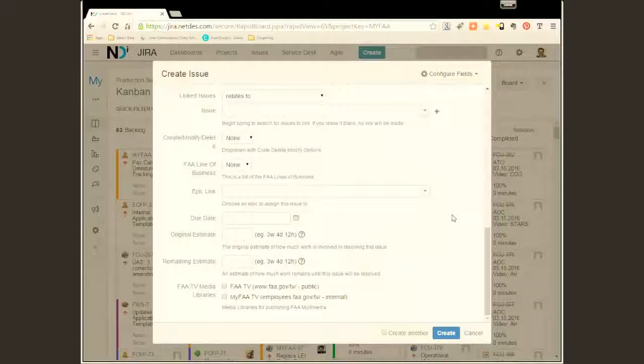Okay, you have buckets, and you have a large bucket, let's call it a 5-gallon bucket, and a 2-gallon bucket, and a cigarette box. So there's 3 distinct sizes. Your large 5-gallon bucket holds everything about the project. You might have 2 or 3 of them to get the project done. Those are your epics. Inside of each of those, you're going to have a grouping of smaller buckets. For example, the large epic is user interaction. So one of the smaller buckets within that large bucket will be create a user account, log in, log out. Each of those would be a smaller bucket.